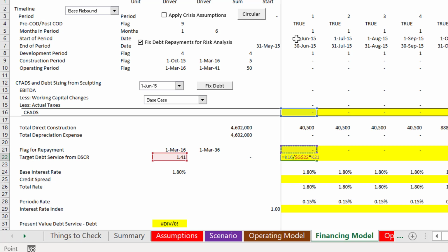And this is the philosophy I'm practicing for this class again, this fundamental philosophy of whether cash flows drive the debt size or the amount you spend drives the debt size. The cash flow drives the debt size. Again, a DSCR is like a buffer you leave when you use Google Maps. When you do that and you get lost like me, you need to leave extra time. That's what the real DSCR is.